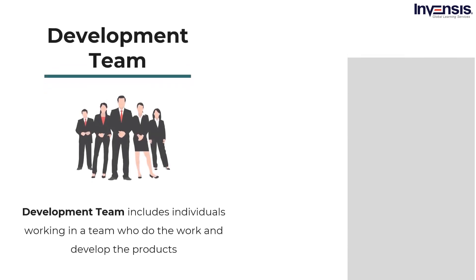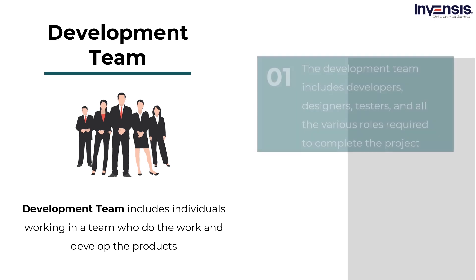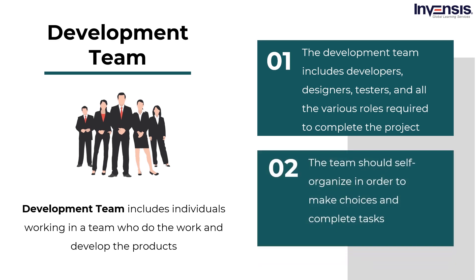The development team includes individuals working in a team who do the work and develop the products. The development team does not only include developers — it also includes designers, testers, and all the various roles required to complete the project. The team should self-organize in order to make choices and complete tasks. Self-organization does not mean disregarding the organization; rather, it means enabling those closest to the job to do what is necessary to address the problem. These are the three prominent roles in a Scrum team.